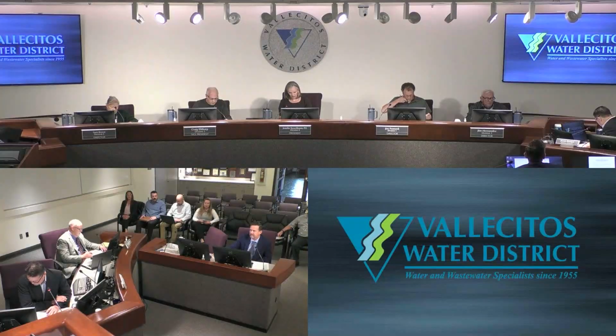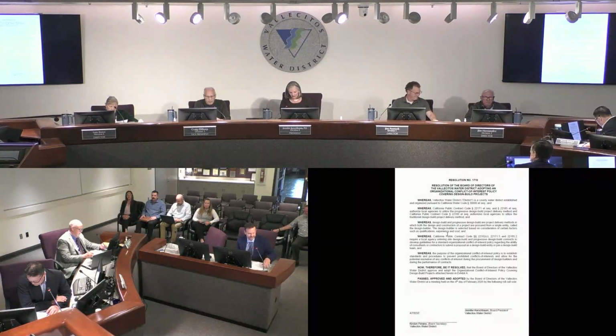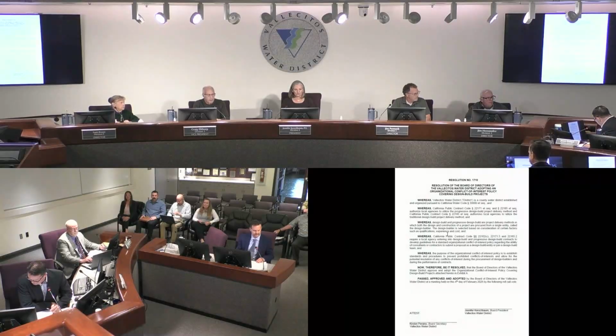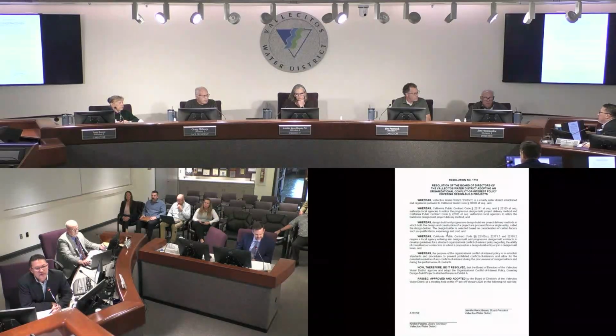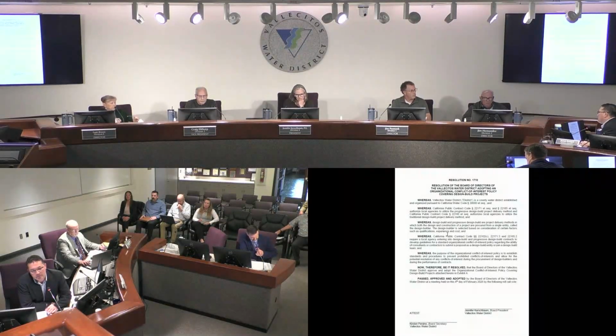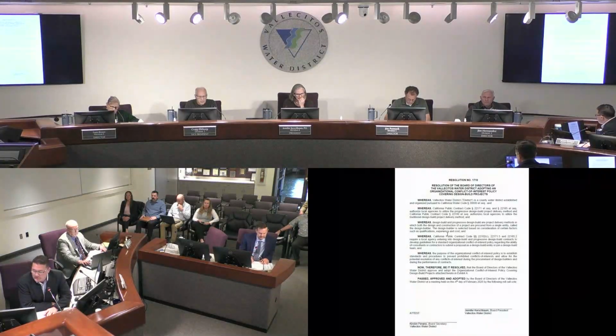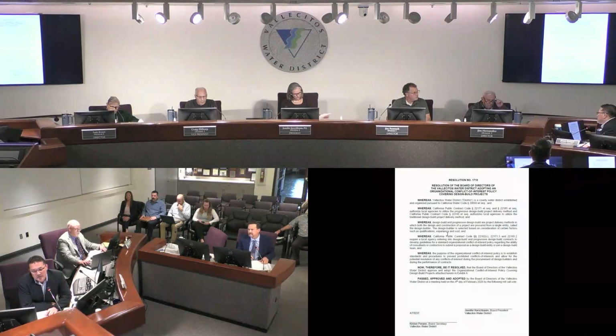Our first action item is to request adoption of resolution number 1710 for organizational conflict of interest policy covering design build projects. We have a staff presentation for this. Thank you, Madam President. This item is for the district to take advantage of the opportunity to use progressive or design build as a project delivery method. Traditionally, the district's always done what we call design bid build, but there are opportunities for design build mainly to save time. I always tell people design build doesn't really save costs usually, but it is another mechanism which could deliver projects at a faster pace or deliver complex projects that spread across many different, let's say, remote sites simultaneously.